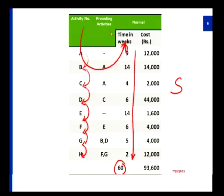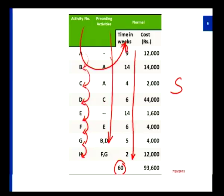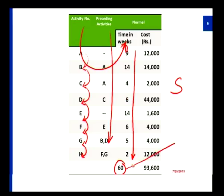After introducing the preceding activity column, we have clearly indicated that for activities A and E, no prerequisite is required, so we can start immediately. B and C can be done in parallel because their prerequisite is purely A. Likewise, when done concurrently, the time factor will obviously decrease. So it will not be the same 60 weeks — it should be something less than 60 weeks. We will have a short break, and after the break we will look at how we can estimate the time.